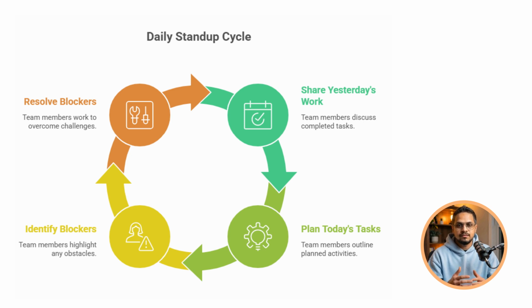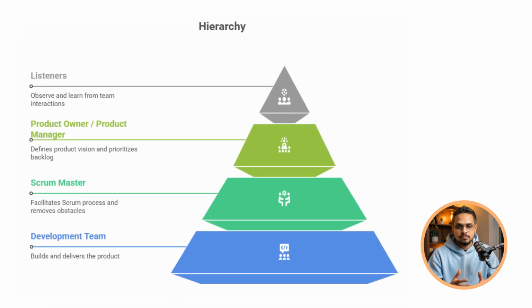Usually, the Scrum Master facilitates daily stand ups, but the meeting is owned by the development team. Now, who should attend? The people responsible and accountable are the development team, Scrum Master, and the product owner. Anyone else can join, but they typically listen only, not participate.